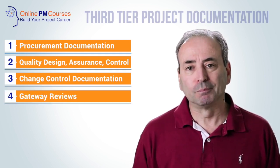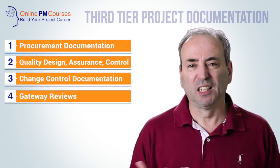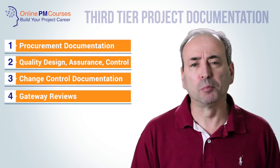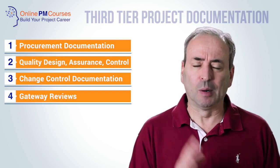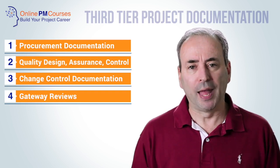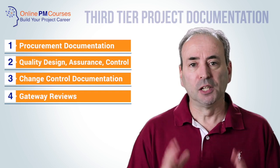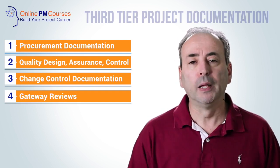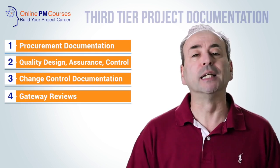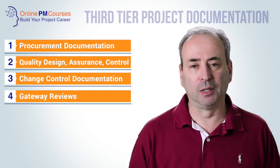Fourth up is gateway reviews. For a small project, yes, you'll have a conversation with your boss or your sponsor or your client at the end of each stage just to update them on where you are and to make sure they're happy for you to proceed. But for larger projects, start to introduce formal gateway reviews. It gives you more control, it gives the governance process more teeth, but most importantly, it protects the organisation whose money you are spending.